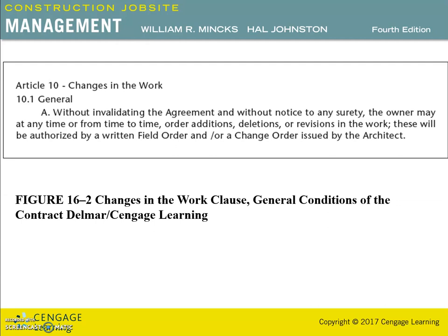So both parties are provided with a clear definition of the work being required and who authorized the work. It is extremely important that the contractor know who can authorize a change order. This is an important issue that should be clarified at the pre-construction meeting.